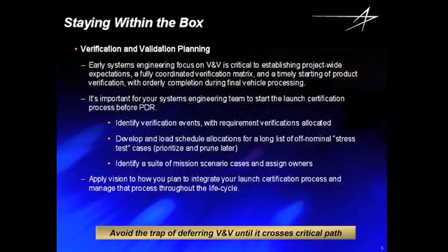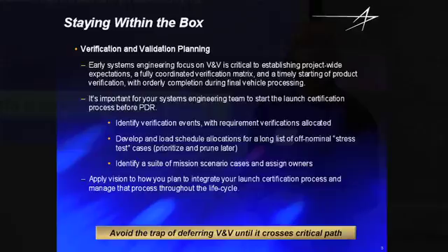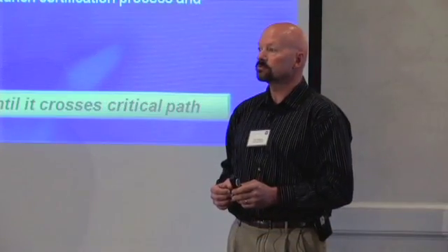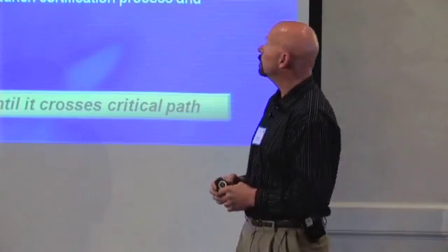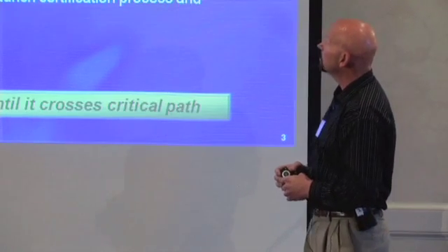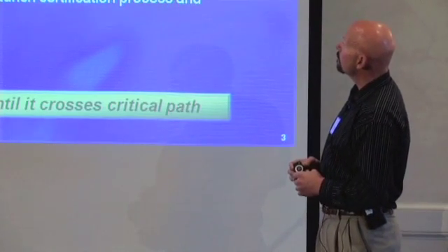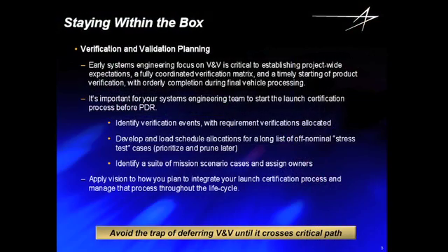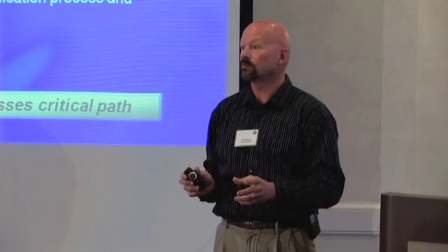The obvious things that people look at are verification events. All right, I've got requirements, I've got some component tests, subsystem, system test, but there's a whole category of validating your system and getting your team thinking early. And this really can't be overemphasized, that the ability of the team to think about off-nominal tests and mission scenario cases and get on that early really helps set the framework for where your risks are going to be.